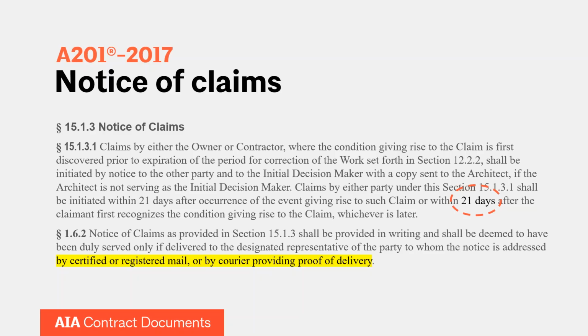So I think that's probably a middle ground that Section 8.31 would work with. I mean, it does say causes beyond the contractor's control. It doesn't mean either stop or go completely 100% of the pace. If you can do it at a moderate pace while still trying to comply with CDC recommendations, that might be a path forward for folks. I would also encourage any owner or contractor who's thinking about doing that, get owner buy-in and architect buy-in of that before you start modifying your work schedule, of course, and execute a G701 change order and document all your costs, those kinds of things.